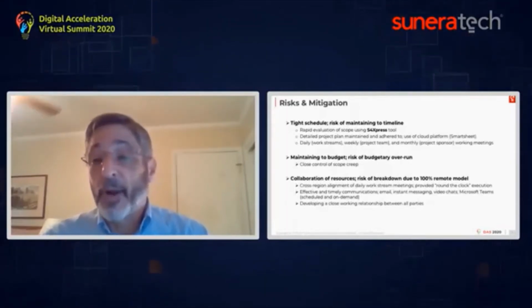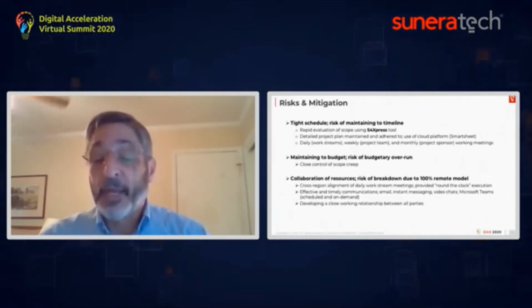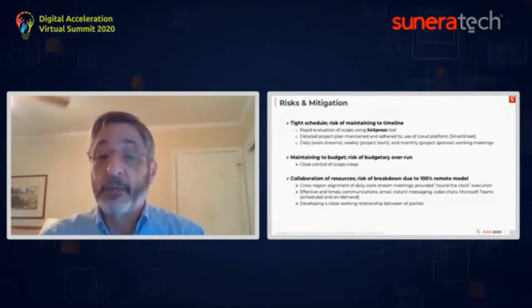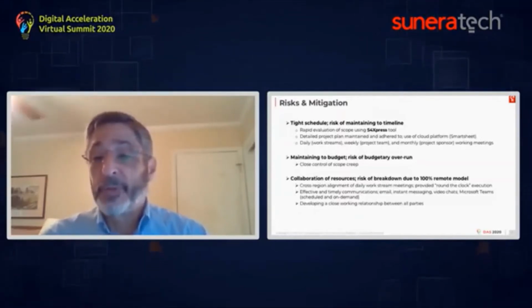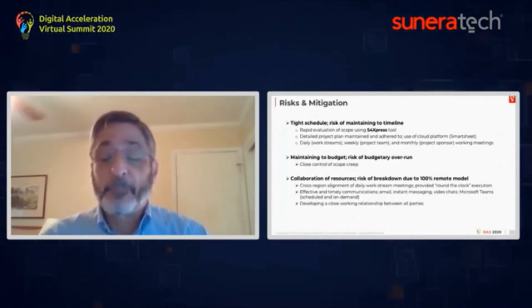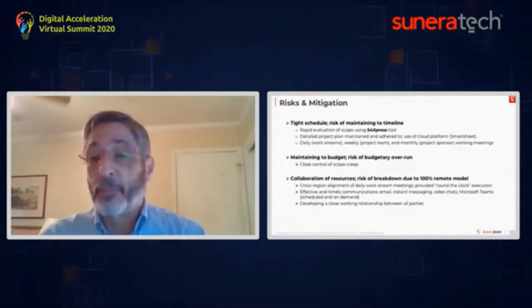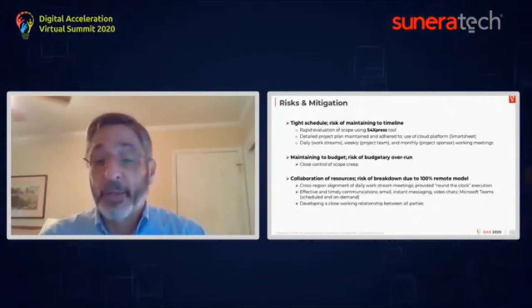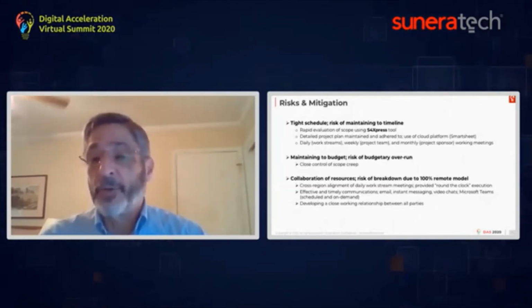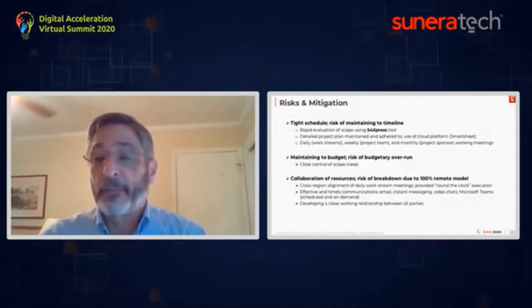Because of the remote requirements, the client and Sunera set up daily workstream teleconferences, weekly project team meetings, and monthly project sponsor meetings. All these were done using Microsoft Teams so that we could have video, audio, collaborative meetings. And those were very good in reducing risk because there was ample communication between all parties. One of the results of doing that type of communication and collaboration was the team got very close to the client's resources. Everyone felt like they were on a single team.